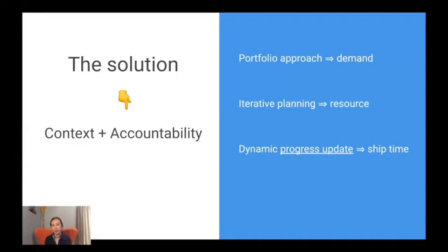But the main reason we want a ship time is because the product doesn't go to market when we release the code. There's always downstream impact in terms of marketing and email communication, sales enablement, training, support, and all the others. If you have partners, you also need to give them a heads up, which means that all our stakeholders, quote unquote, on the business side need to know what is coming so they can plan and work on what they need to take the whole product to market. Therefore, having an understanding of when certain features are going to be available is very important, not just to hit a date, but more importantly, for our downstream stakeholders to know what to do. And it's really important for them to have the ability to see what's going on.